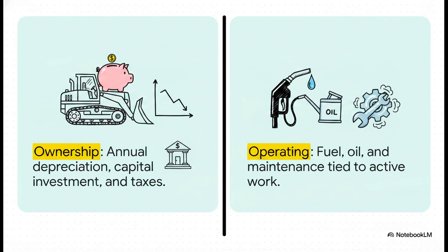Operating costs, though, only kick in when that machine is actually working. That's your fuel, your oil, and your maintenance tied directly to working hours. Bottom line, turn the key off and operating costs stop. Ownership costs? Yeah, they never sleep.